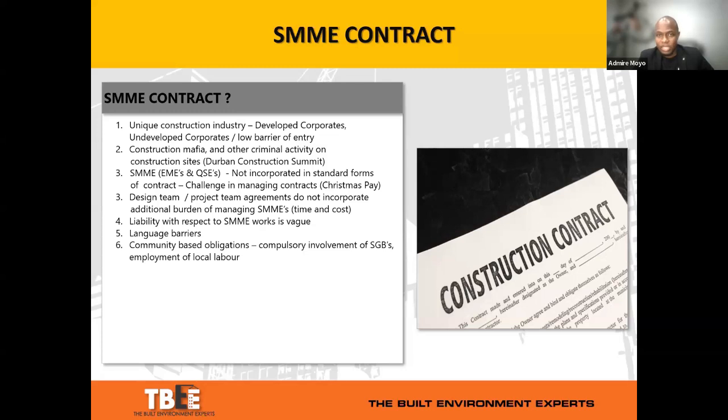So that leaves the design teams often in a situation where they're trying to balance various responsibilities, and they try to incorporate implied objectives either in the contract data or in meetings, things that were discussed in meetings, and they try to fit it in a contractual framework, which often leads to disputes and litigation.